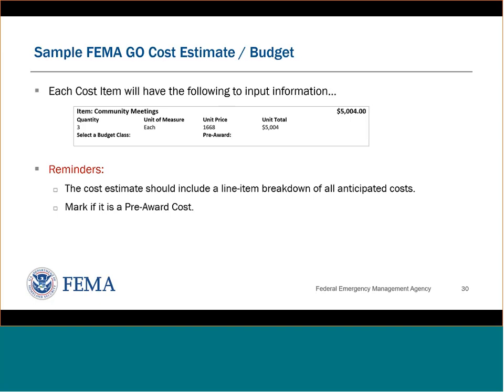And this would typically always align back to your scope of work and work schedule. So if we would go back to the scope of work and work schedule, we'd see there would be 3 meetings occurring, and this all ties together. So a lot of these, the budget will be reflective of that scope of work. So we'll see a lot of those tie-ins there.